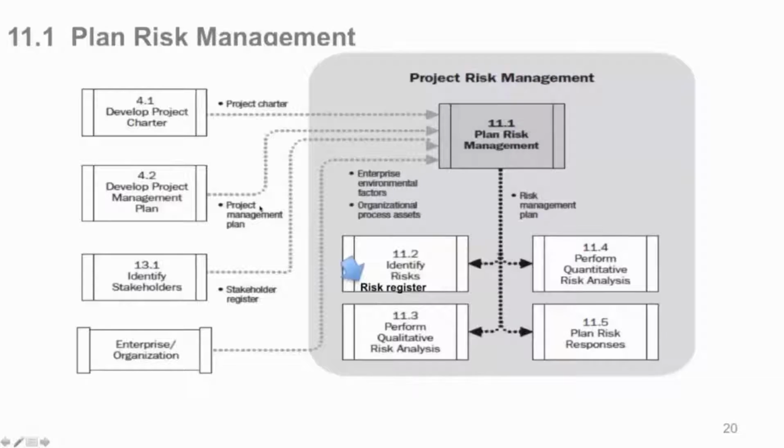Okay, but now, we're further along perhaps in our project a little bit where we've actually, over here, started creating our project management plan and all subsidiary components of scope and cost and time and quality and procurement and all of them. And all of those will have some risk component to them. So that's why the project management plan comes in as an input, because it provides insights into possible risks at this point in time, whatever that might be.